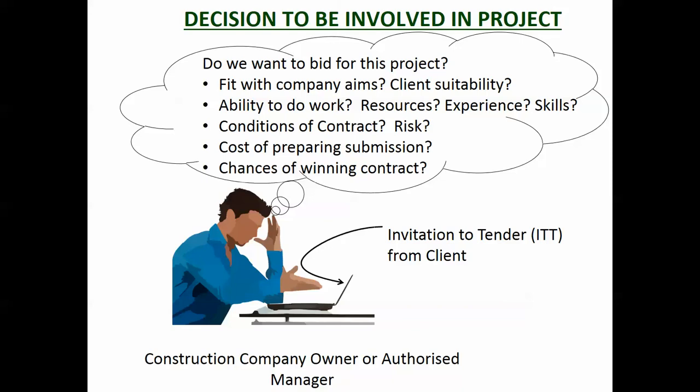Some clients decide to make their own conditions of contract because they think they're saving themselves money, and the contractor might look at that and say, well, no, those aren't fair on me. They're putting all the risk on me. If anything wrong happens, even if something that's beyond my control happens, I'm still going to pay for it. I'm either going to put a massive amount on top of my price, or I'm just not going to bother submitting a tender.